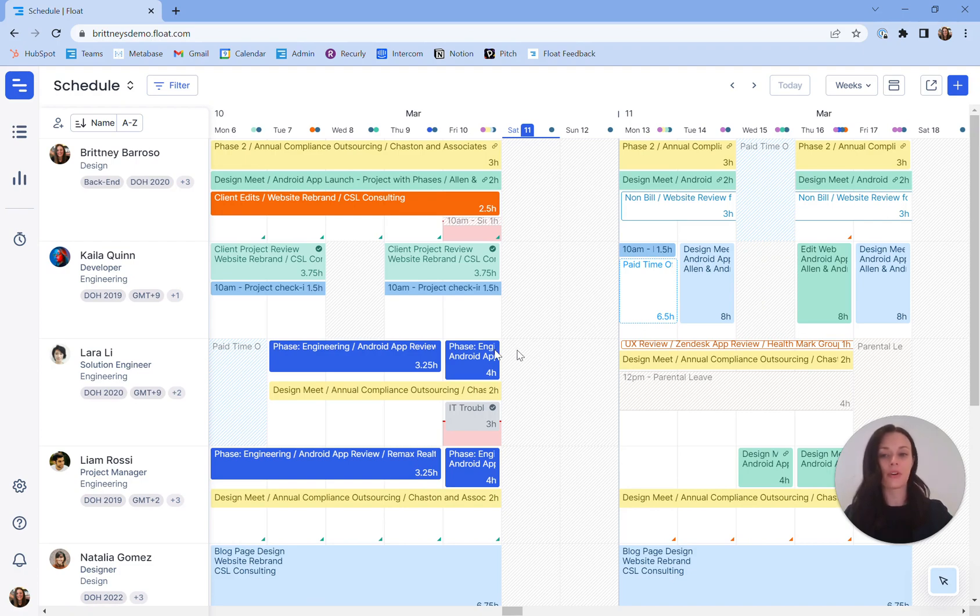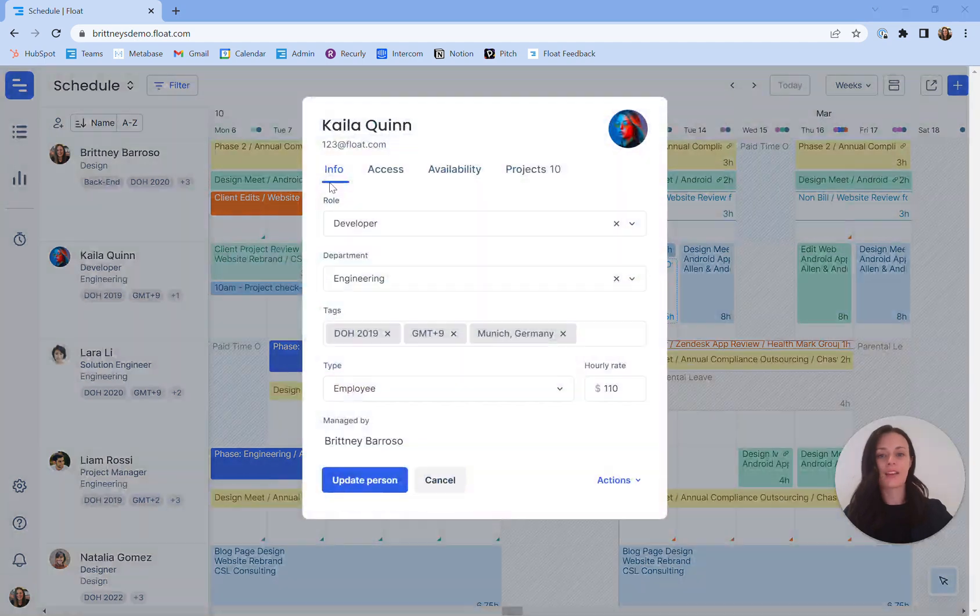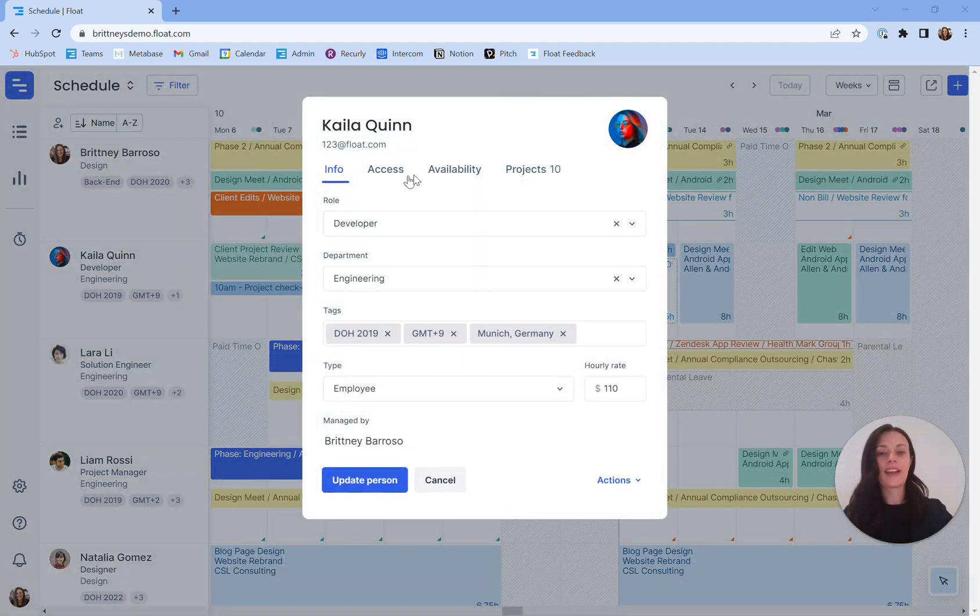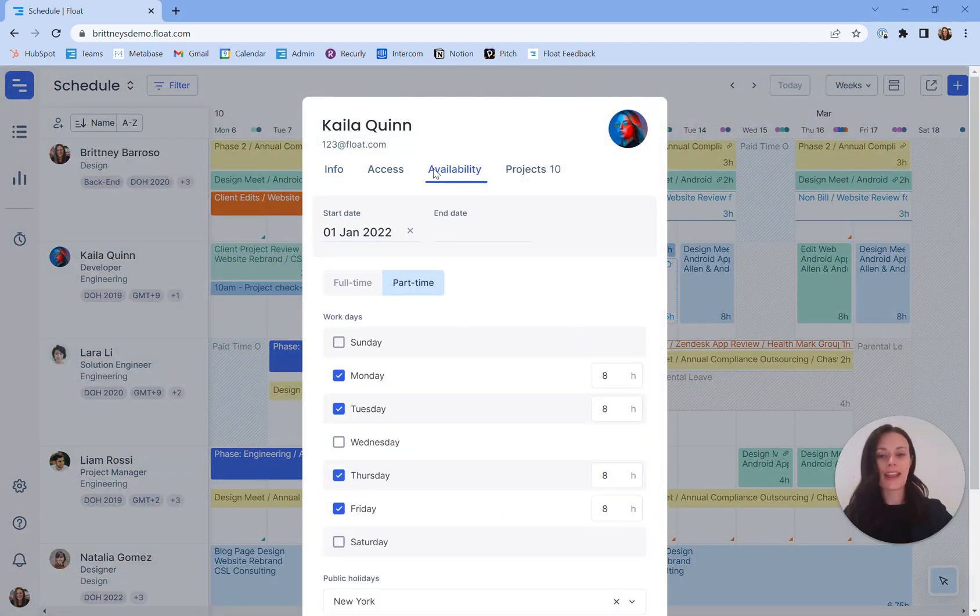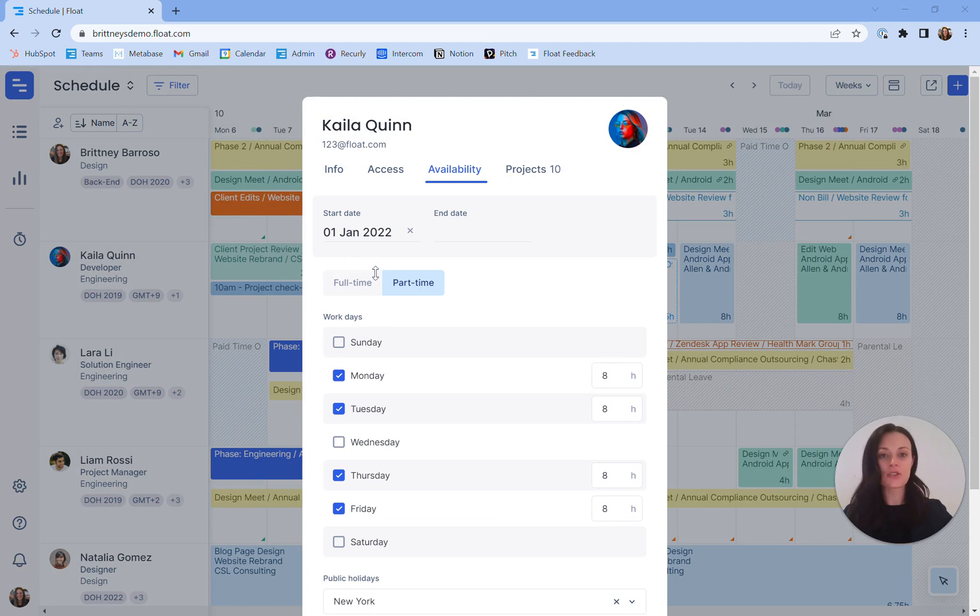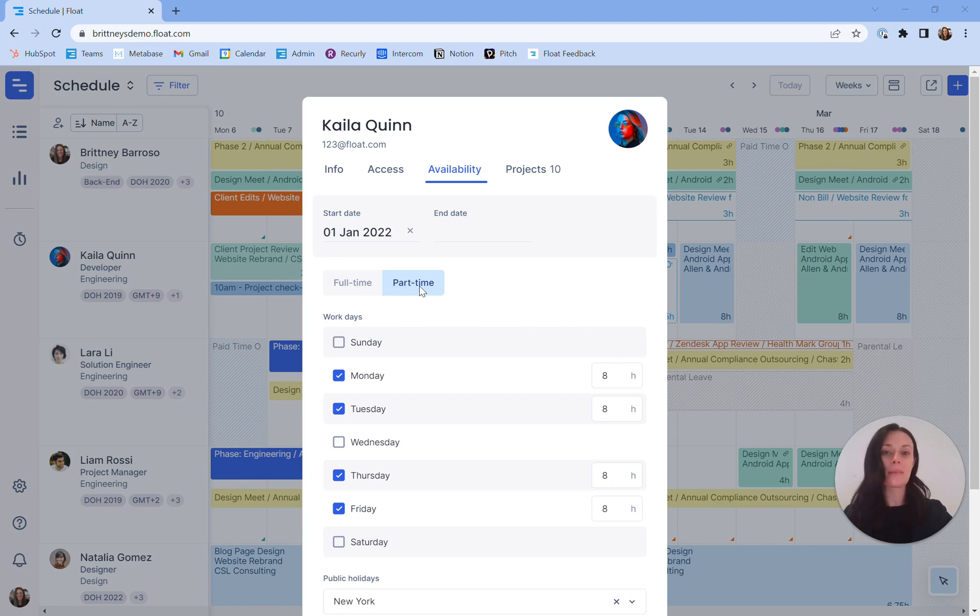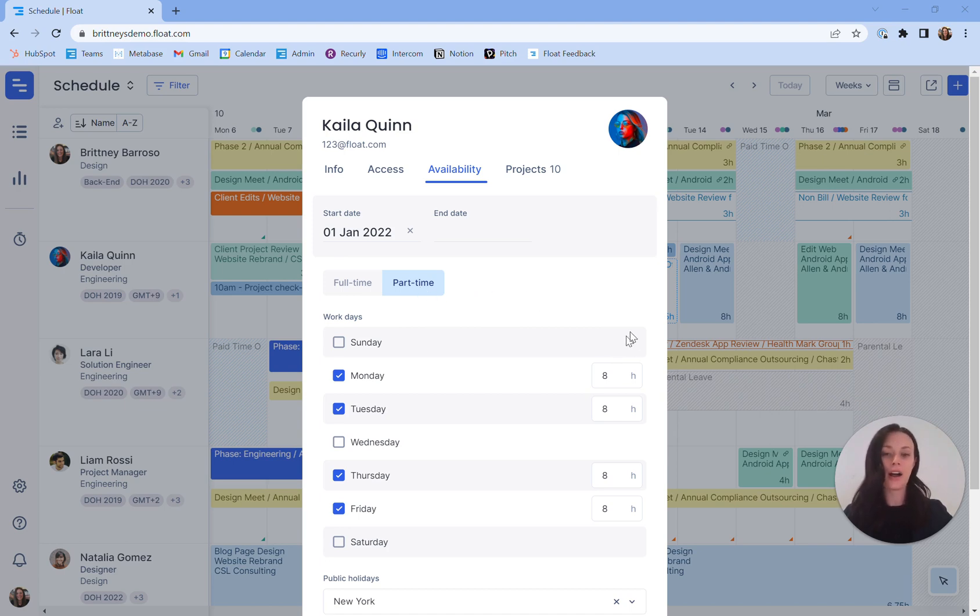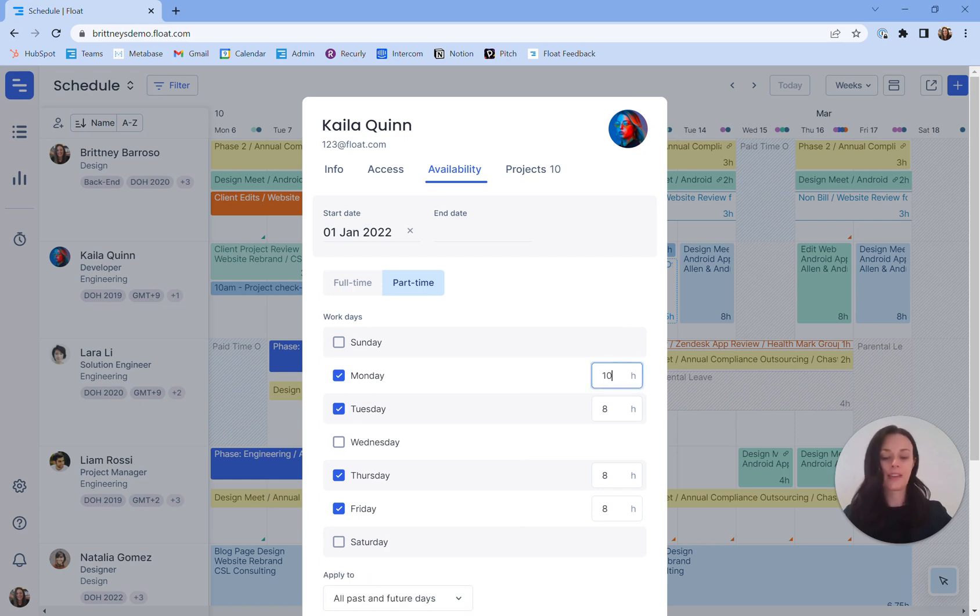And then you'll want to set your team member's specific adjustments within their individual profile. For example, let's navigate to Kayla. Now navigate over to Kayla's availability. Anyone with a full-time schedule is going to be set to the team's specified schedule from your settings. A part-time schedule simply means a schedule that falls outside of the lines of your team's typical workday. You can adjust days and work hours per day above or below full time. And you'll notice here Kayla's always out on Wednesdays.